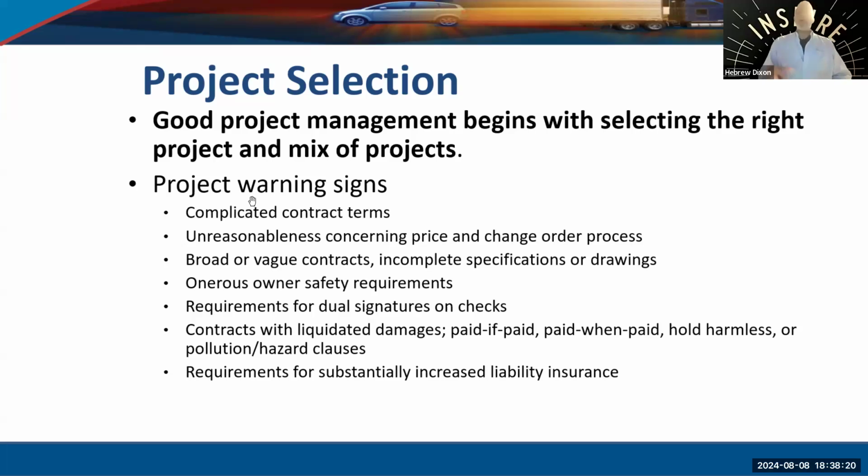That means that you can do the work, and the owner doesn't get any money, or something happens, you're stuck like Chuck, right? You're not going to be able to really get remedy for that. So I would definitely advise you to pay when paid. You can negotiate that a little bit, but pay if paid is, a lot of times generals want to put a pay if paid on there. Well, what if I don't get the money? You know, that's an issue. I think you've got to be real clear. If someone wants you to do the job, they've got to have the money.